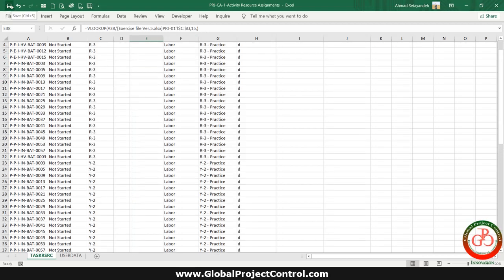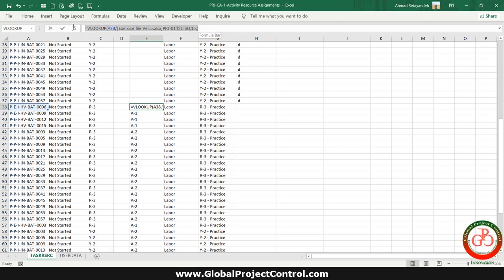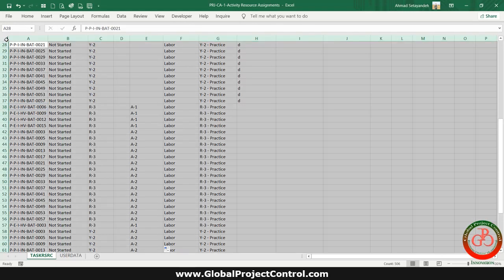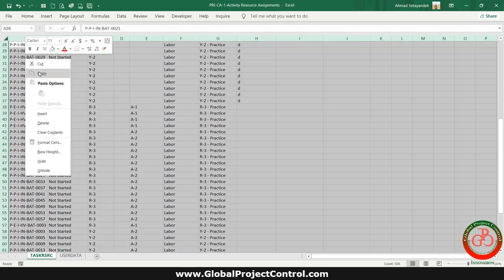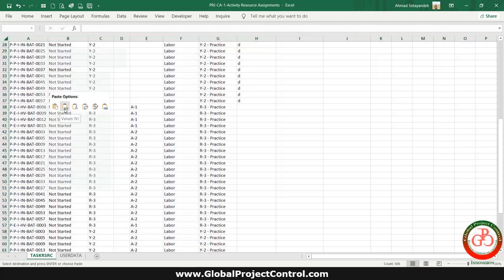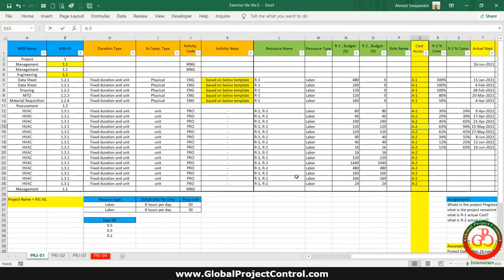Because if you are going to save this table and import it to the P6, P6 cannot think that the result of formula is required to be updated and used in a table. And the software thinks that you want to import the formula. So you face it with error. What's the solution? The solution is use select all, use the copy and paste it as a value. Then save the data and close this file.